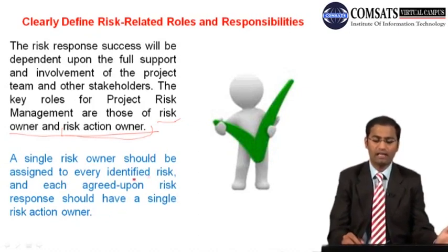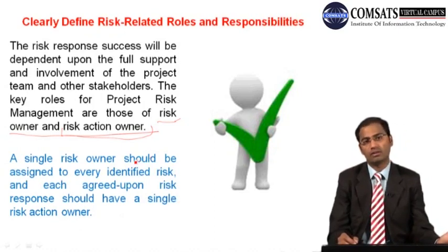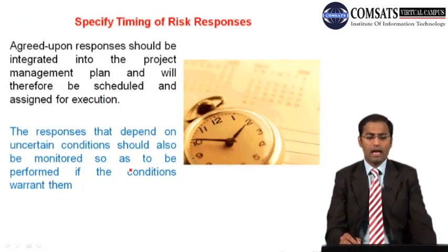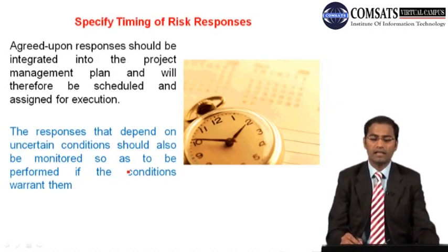We have already talked that every risk should be given to somebody for keeping an eye and for action. But this does not mean that only one person will handle one risk. One person may be the risk owner of 10 risks and the risk action owner of 2 risks. And the third thing is to specify the timing of risk responses.